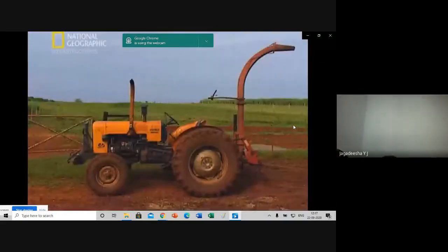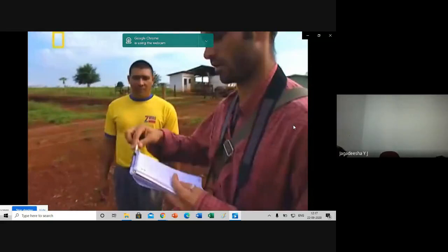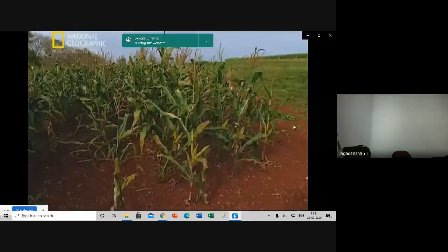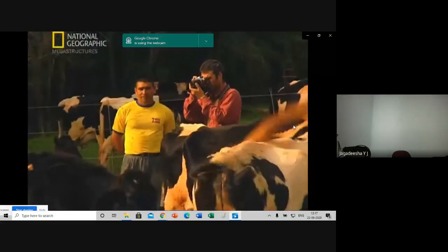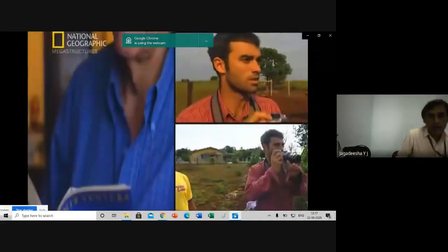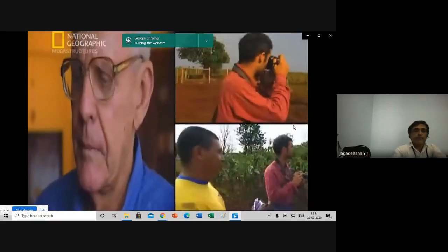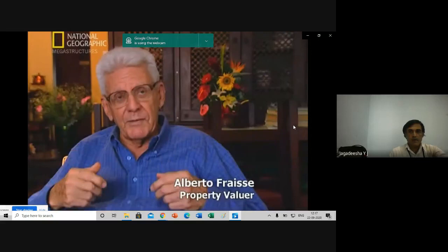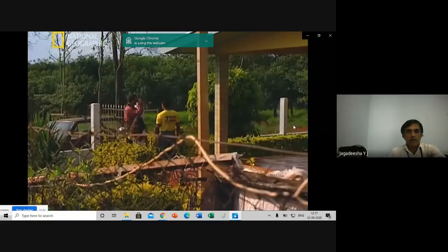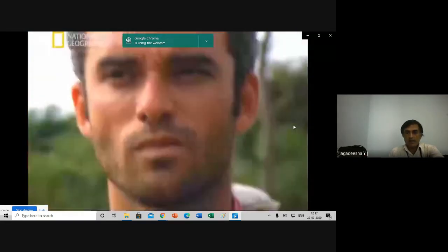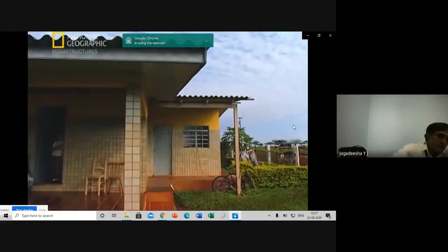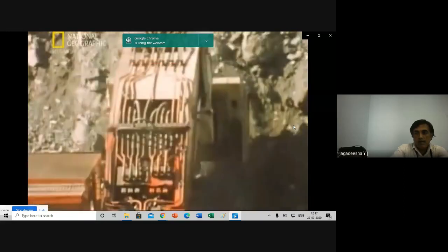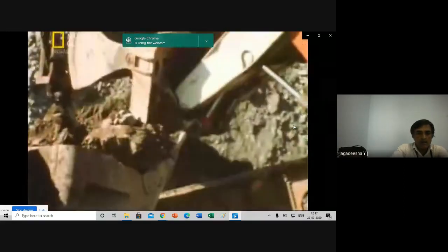These men and women were on a mission. They had to get an accurate valuation of every home and its surrounding land. Everything was recorded and photographed. Alberto Freis valued hundreds of homes. The houses were measured, described, and photographed one by one. And all belongings, even if it was just a stool, it was photographed. While the valuation process was seeming to take forever, the digging of the diversion channel was right on schedule.